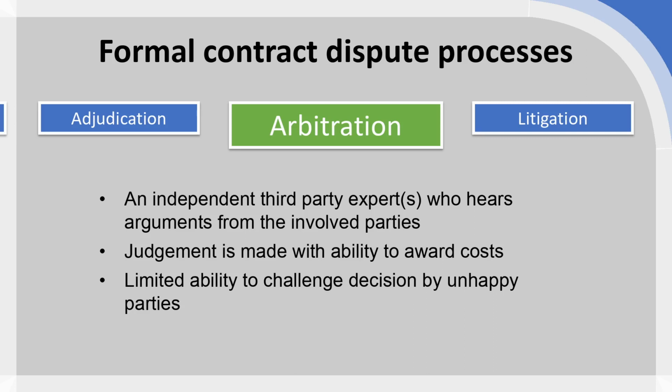So if there is a process flaw or something being missed or something clearly faulty in the process to reach a decision, that is grounds, or limited grounds, for appeal. But anything which is not part of the process but based upon the judgment itself, i.e. the arbitrator was biased, the arbitrator shouldn't have judged in this way, the arbitrator was being unfair, all of these things will be dismissed and are not grounds for appeal.